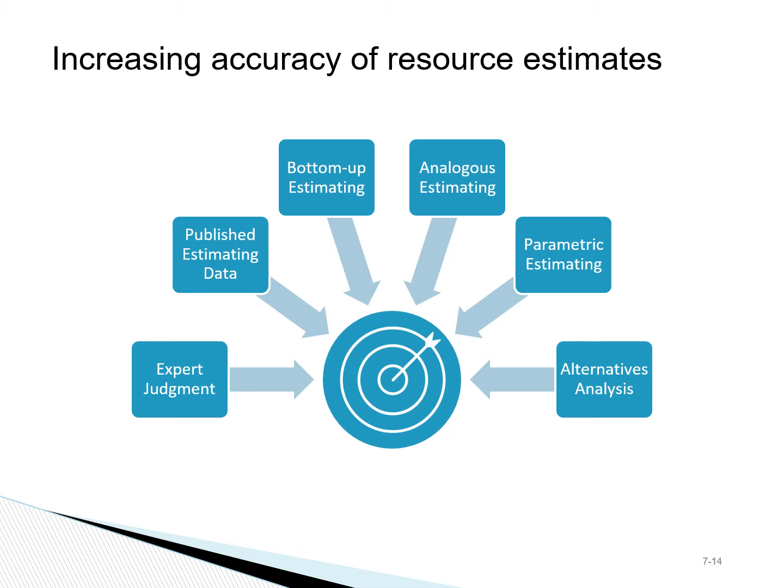If we have the estimate for a task that is smaller or bigger than the task for which we need to estimate the resources, we can use parametric estimates. Is this twice as big or maybe half as big? And then accordingly we can adjust the estimate.